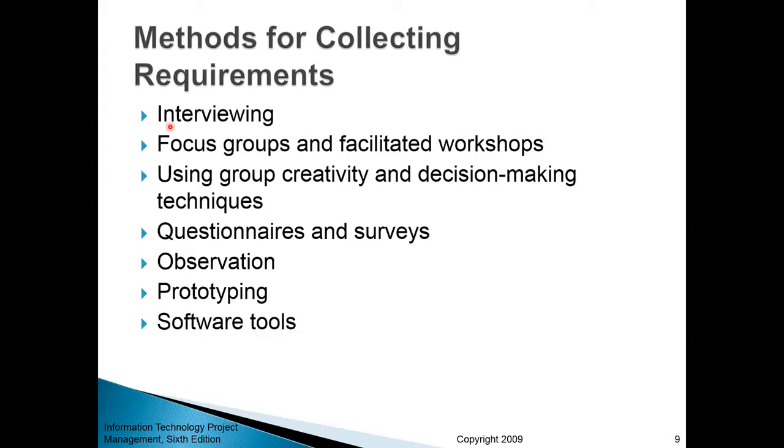But also interviewing can be costly because it's a big burden on time. I mean, you have to spend your own time interviewing people. People will also spend their own working time, and sometimes you schedule a half an hour interview, but before you schedule it, you spend 1 hour communicating back and forth, trying to find an appropriate slot for that interview. Then somebody comes late by half an hour, then you extend your interview by another half an hour. So the next thing you know, half an hour becomes 3-4 hours of somebody's work time, which is quite costly if you're interviewing dozens and dozens of users.